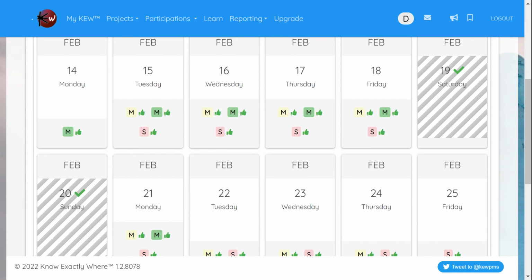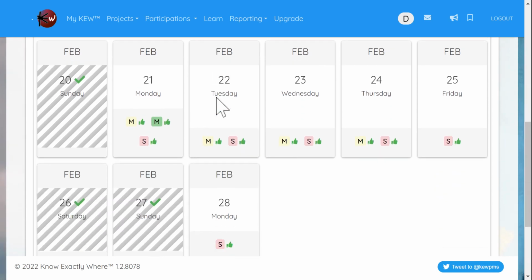The fact that something hasn't started doesn't mean that it's unhealthy. It may not have started because it's not supposed to be started yet, so that's fine. But if something should have started and hasn't, you will see it there. Or if something should have finished and hasn't, you should see a thumbs down as well. So those are the two features.